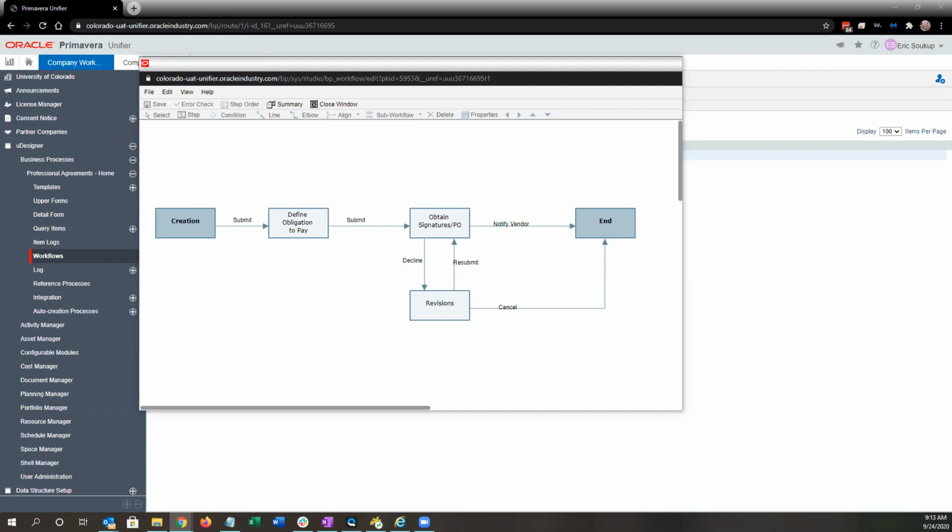The most of this was around the need for the condition precedent clause, because we're going to enter in the full compensation, but then we're going to separately define what we're actually obligating to pay based on current funding. So in many situations, those will be the same, but in some situations where the condition precedent clause applies, you may only be funding the first two design phases. And then until you get additional funding, you'll be adding those additional phases later through an amendment.